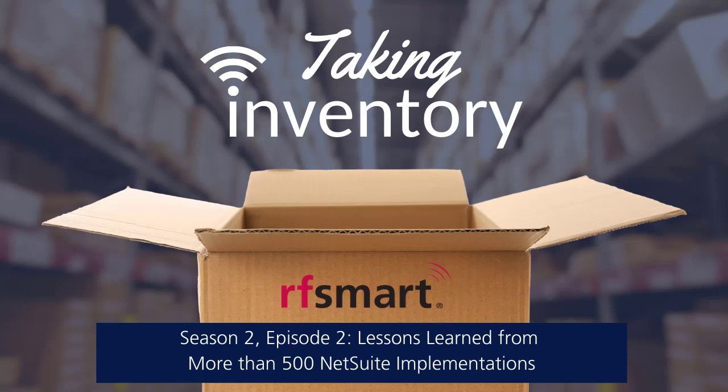But there's a lot of things that go through it because as an organization, when you're changing business platforms, you want to make sure that you're bringing clean data over. You don't want dirty data in the system. You don't want old inventory products or old pricing or descriptions and things like that. So what happens is you're exporting your data from your current system. You need to cleanse that before the implementation team will put it into NetSuite and upload it into NetSuite. So it takes time to do that.